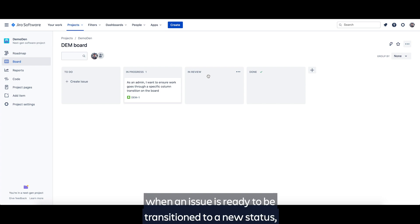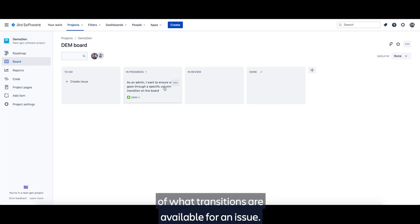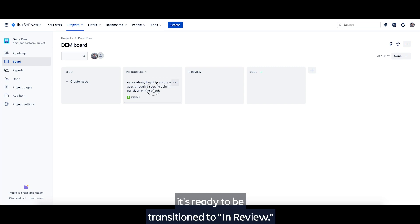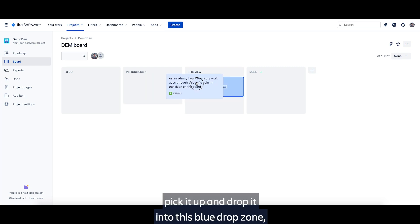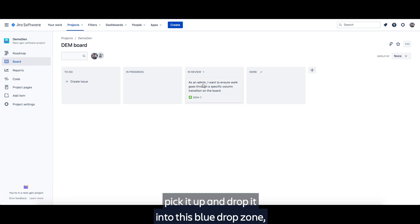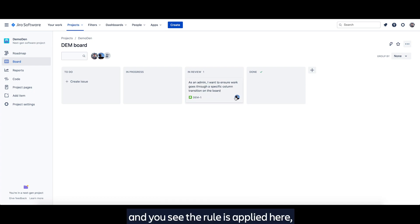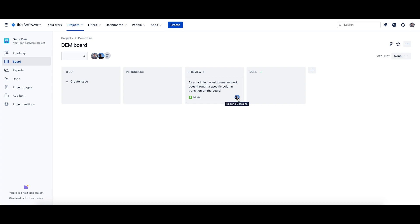To give all users context of the workflow via the board, when an issue is ready to be transitioned to a new status, we've introduced drop zones. Drop zones are visual cues of what transitions are available for an issue. In this case, I've completed my user story. It's ready to be transitioned to in review. So I'm going to click it, pick it up, and drop it into this blue drop zone.